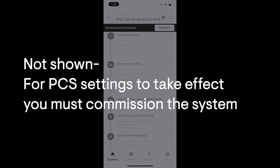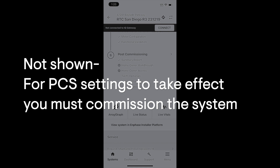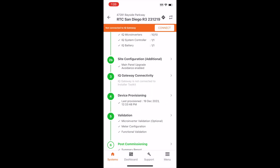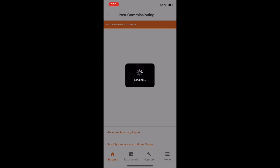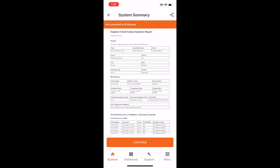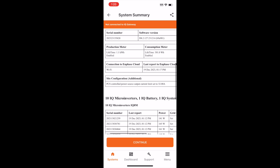This means you need to provision the hardware, test the energy metering CTs, and functionally validate the system. If you want to verify or generate a record of your PCS setup, navigate to Post Commissioning and select Generate Summary Report. Look at the section titled Site Configuration Additional — you'll see the PCS feature listed along with the designated current limit that was specified by you.